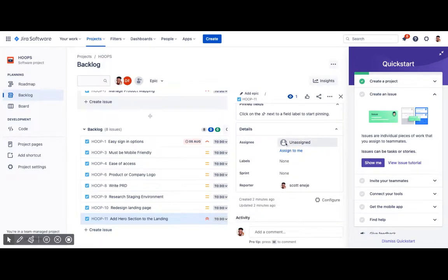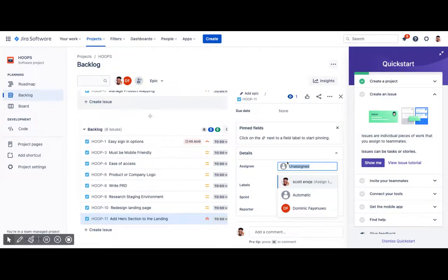I would then have to assign who gets the ticket, right? Now, the process of assigning who gets a ticket is something that happens during a sprint plan. Sprint plans are one of the events that happen to start a sprint or before a sprint is started. What the planning process does is it allows the team to understand who gets what is supposed to happen during the sprint, how it is expected to happen, if anyone would require more details about their work, or if there is a chance that there would be something else that would be needed to achieve a